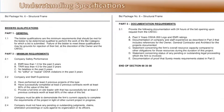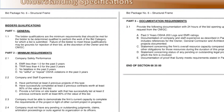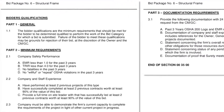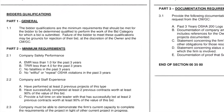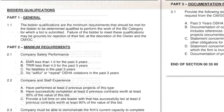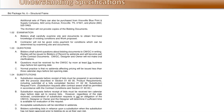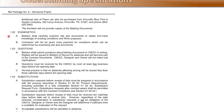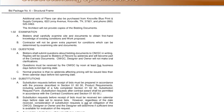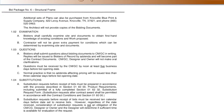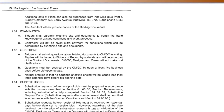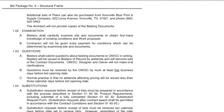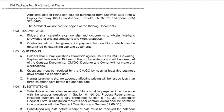Now let's take a look at a few gotchas in a typical set of specs. Note the bidder's safety performance requirements and the supporting documentation that must be submitted prior to bidding. Note also that the contractor must carefully examine the site prior to bidding and will not be compensated for conditions that could be determined by examining the site. This might be a gotcha if you don't follow the specifications and find something later — the owner can fall back on this portion of the specification.